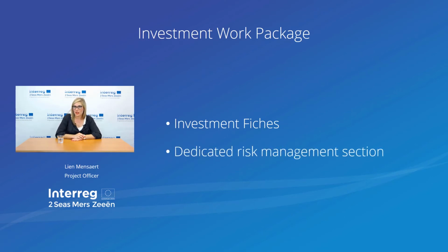There is also a dedicated risk management section, because for every investment we all know that there are specific risks attached to this investment, as there is procurement, there can be delays, some investments can have an impact from weather conditions, etc. So it's very important to take the exercise of a risk management approach very seriously when drafting your investment work package.